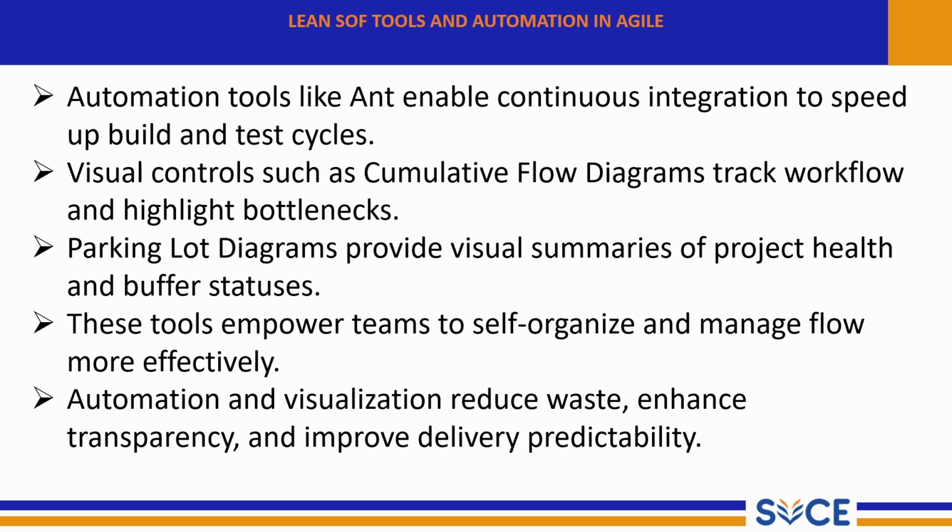Parking lot diagrams provide a visualized summary of project health and buffer status. A parking lot diagram gives a simple high-level view of all modules or features in a project. It uses colors or labels to indicate which areas are on track, delayed, or at risk. This helps managers and teams quickly understand the project health and buffer usage.